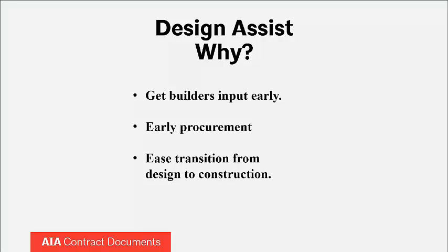There's also a handful of other good things that can come out of using design assist on your projects. It's going to be helpful to the owner and the design team if the folks who are giving design assist services can identify things that might have a long lead time. So if there's any need for early procurement to make sure that you get equipment or materials on the site early, the construction folks are going to be the ones who are in the best position to determine that and help identify those things. Also, there's a notion that doing design assist and bringing on someone like perhaps a construction manager and their team early to the project can ease the transition from design to construction.